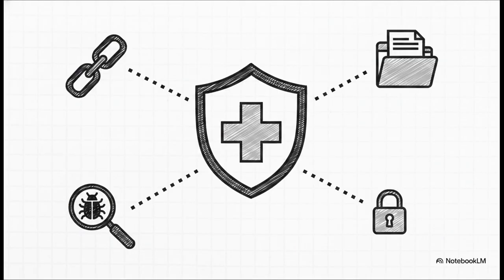Instead, you need to focus on patient-protecting metrics. These are the numbers an auditor is actually going to care about. Traceability completeness ensures every single requirement links directly to a tested result. Risk control completion proves your safeguards aren't just coded, but actually verified for effectiveness. Tracking escaped defects tells you if your process is actually catching real issues. These are the metrics that prove your evidence is complete and ultimately that your product is safe.